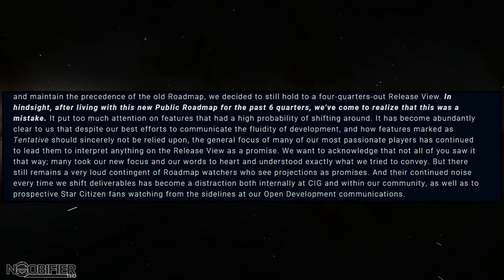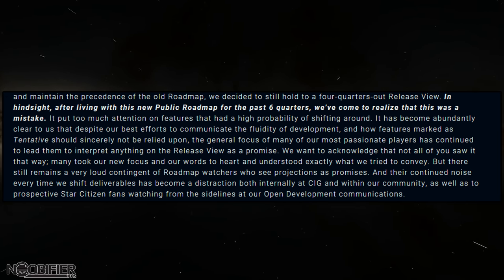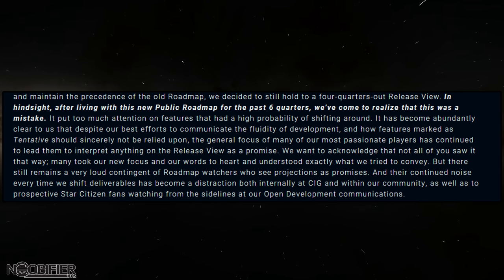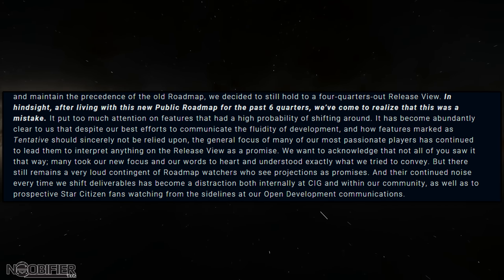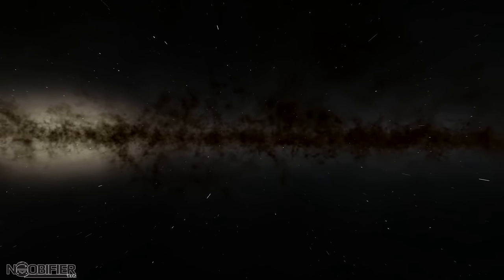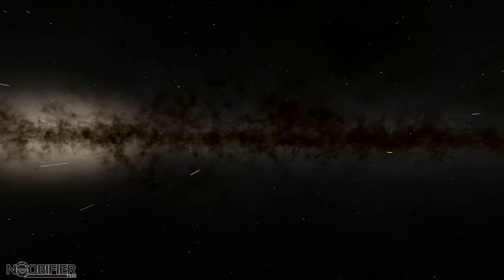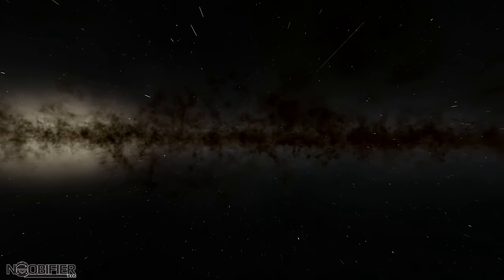Jake continues: in hindsight, after living with this new public roadmap for the last six quarters, they've come to realize it was actually a mistake. It puts far too much attention on features that have a high probability of shifting around, which results in community frustration. Because development is fluid, tentative stuff goes on the roadmap and we think it's locked down, then when it disappears — as the caveats say it might — everyone gets upset, there's drama, and it's negative when it's supposed to be positive.